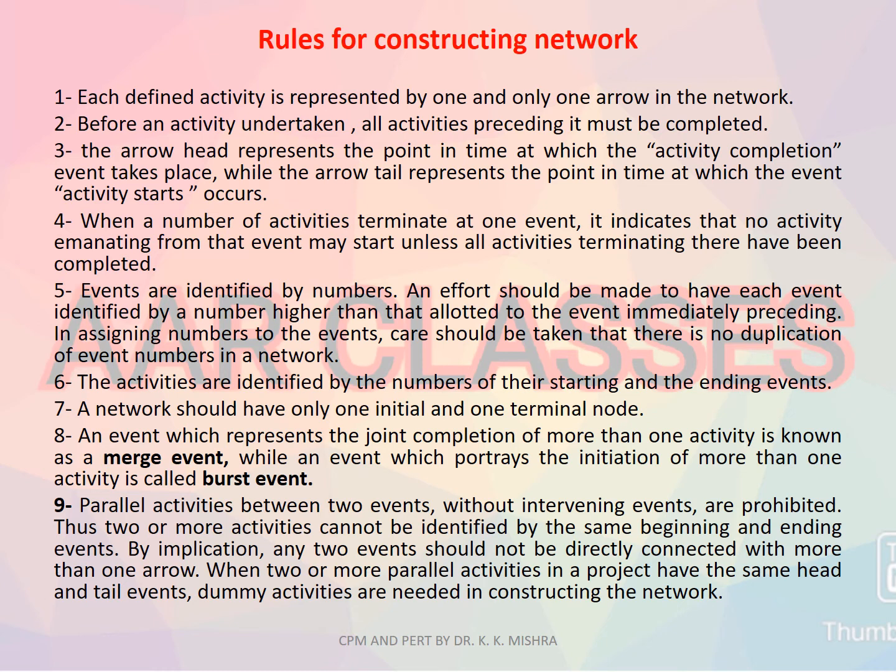Fourth, when a number of activities terminate at one event, it indicates that no activity emanating from that event may start unless all activities terminating there have been completed. Events are identified by numbers. An effort should be made to have each event identified by a number higher than that allotted to the event immediately preceding. In assigning numbers to the events, care should be taken that there is no duplication of event numbers in a network. The activities are identified by the numbers of their starting and ending events.